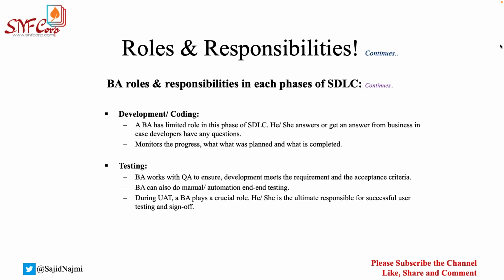So what will happen? This will create a big problem for you, because you will now have to discard everything and go and do the same thing for the other brand. So this will cost you more than the actual cost of the work. So it is very important for a BA to collect the requirements very clearly, very concisely, and approved. If the business has approved brand A, you must show them the reference. Sir, I understand you need the other brand B, but here is the documentation. When initially we were capturing the requirement, you reviewed it and you approved it. Look at this one. What does it say? What brand does it say?